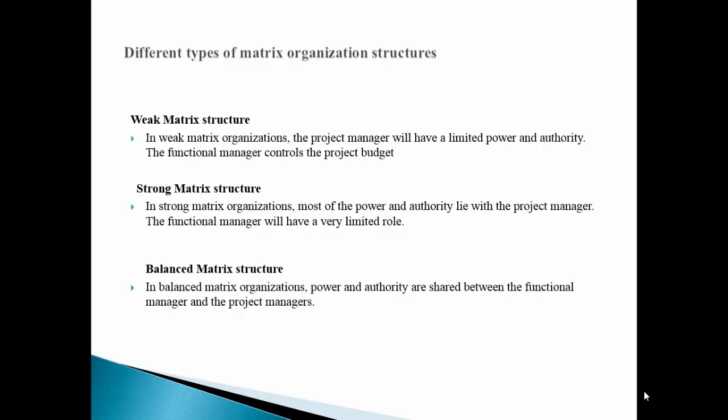One way of reducing the problem is to make rules within an organization that vary who can manage a worker, depending on certain circumstances. For example, there could be a rule that says if a worker is to work on a project for less than 1 week, then the functional manager or project manager has sole control over the worker. But if the requirement is for more than 1 week, control changes hands, or there can be rules that the same worker can't work for the same project manager on 2 consecutive projects.